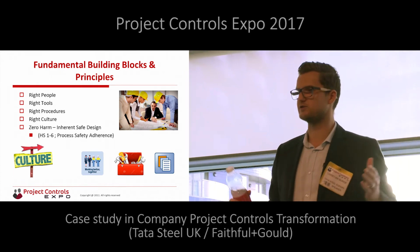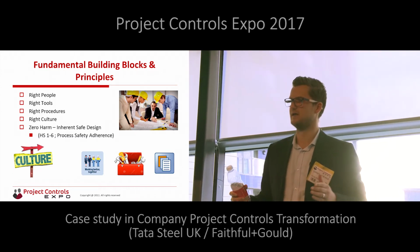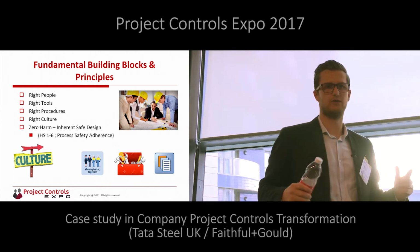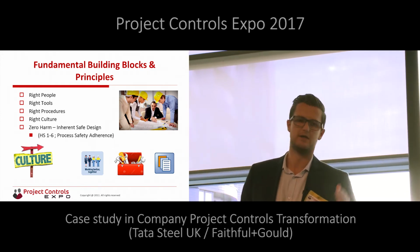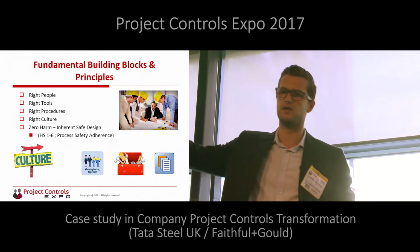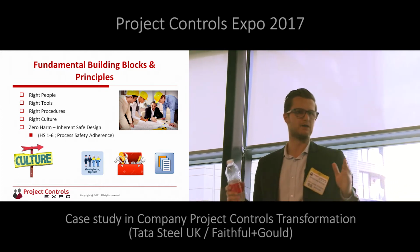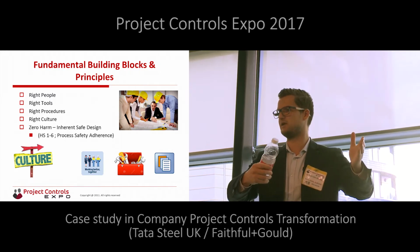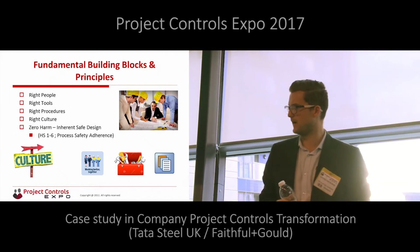There is a hazard study process that we have to undertake and abide by, and that's all around inherent safety design. So it's right from concept through to handover and closeout. It's understanding the management of change, the HAZOP, the LOPA study requirement, from putting in a machine to dismantling something and putting in a new line, a new blast furnace. It's understanding the effects on process safety and the safety of that kit going in. So for us, it helps drive the mandatory compliance with some of our stuff that sits in the project manual. So it's supporting that as well.